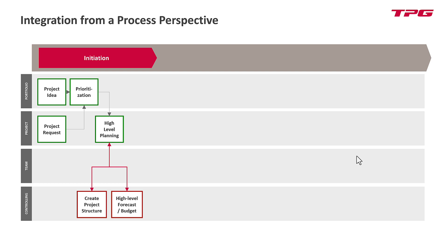A project structure is something that is needed. The project structure could start on the PPM side — the green one — and be transferred into the ERP system. That's exactly what we're going to show later in the live demo. Or it could start on the ERP side in controlling, where they define a project structure and hand it over to project management, asking project managers to do high-level planning against this cost breakdown structure — which is really what controllers usually think.